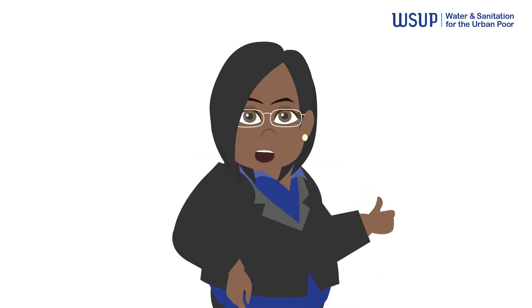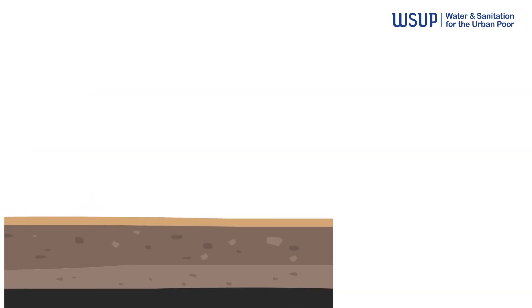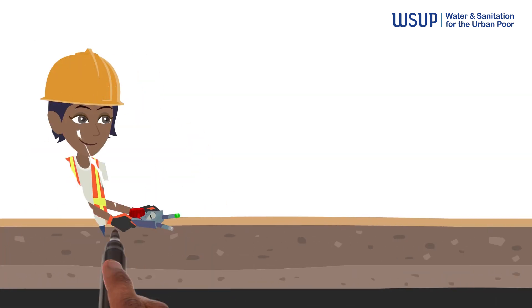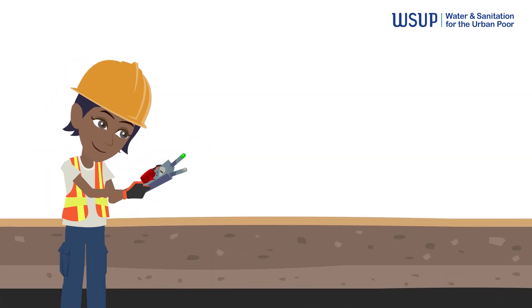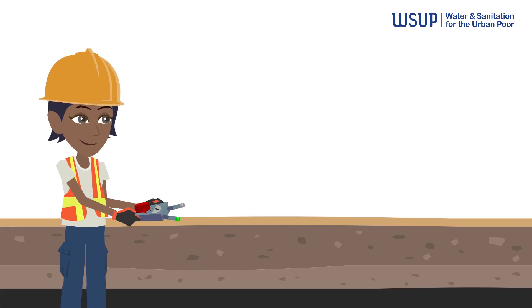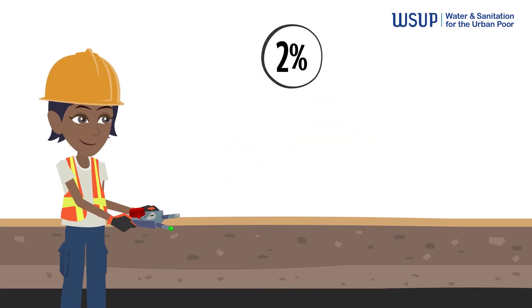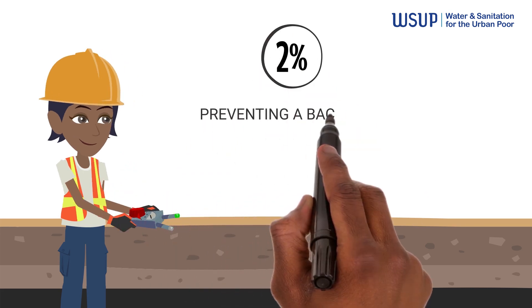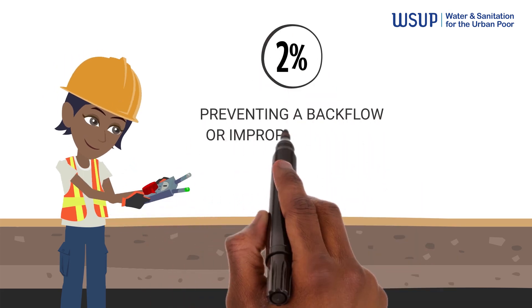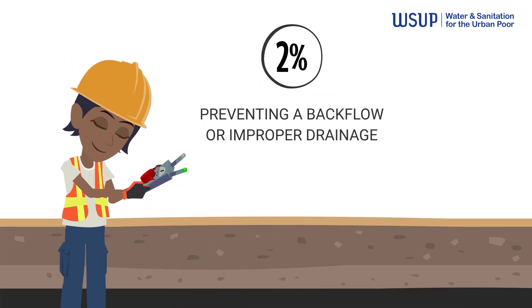Excavation marks the beginning of trenching. It is crucial to conduct a thorough survey to maintain the proper slope, as sewer systems rely on gravity flow. A two percent slope is ideal, and any deviation can lead to backflow or improper drainage.